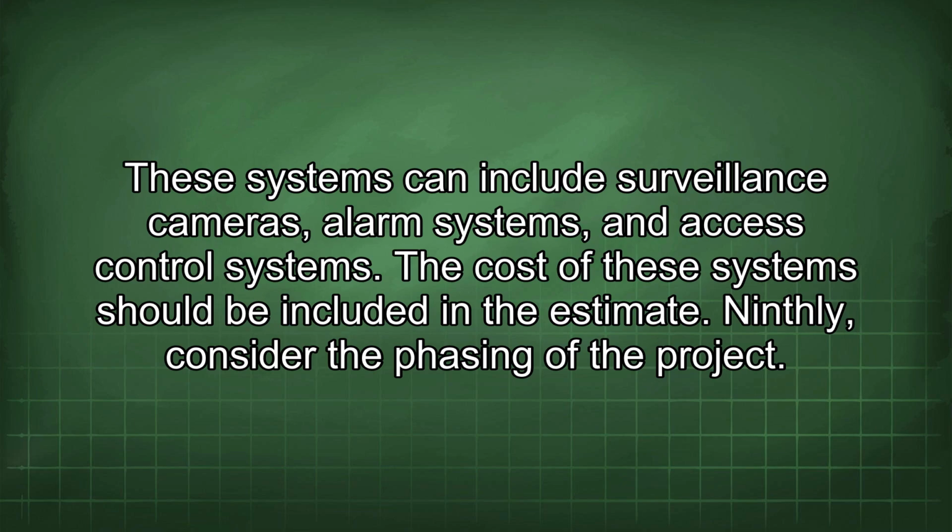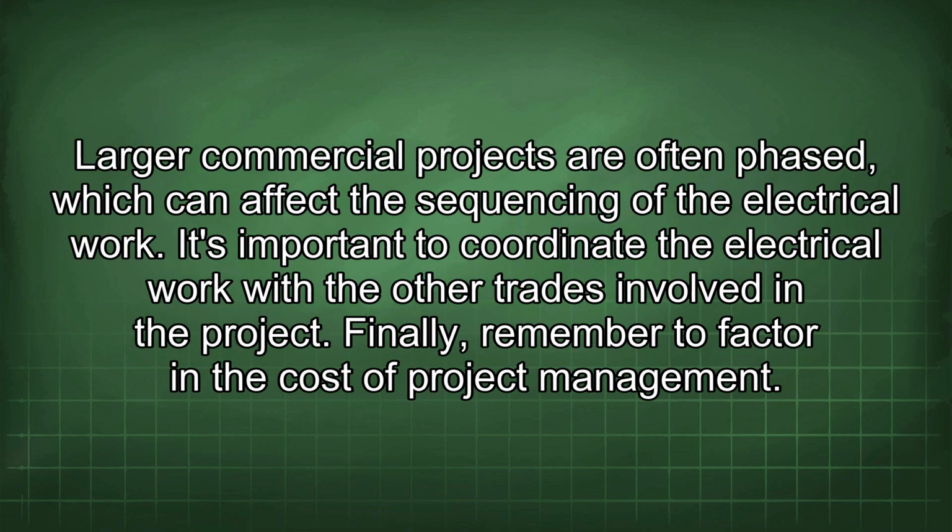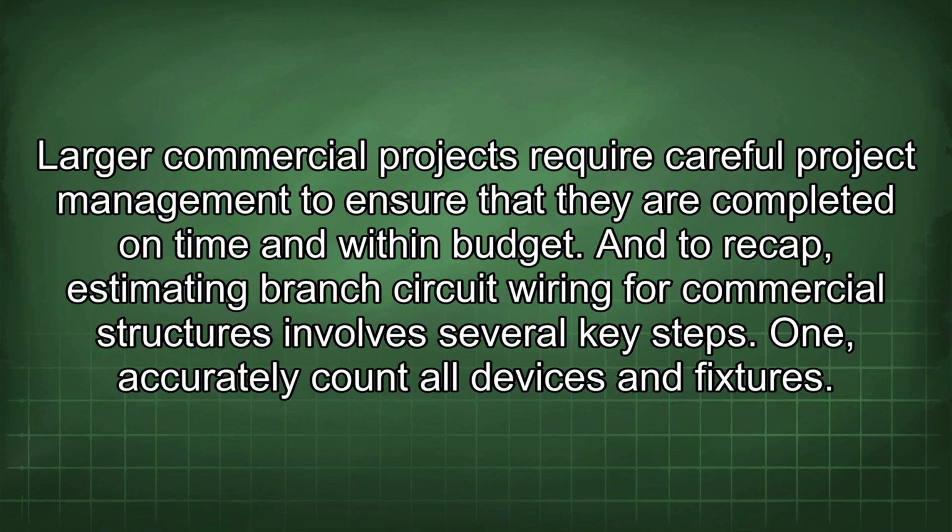Ninthly, consider the phasing of the project. Larger commercial projects are often phased, which can affect the sequencing of the electrical work. It's important to coordinate the electrical work with the other trades involved in the project. Finally, remember to factor in the cost of project management. Larger commercial projects require careful project management to ensure that they are completed on time and within budget.